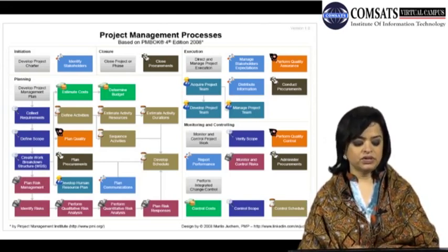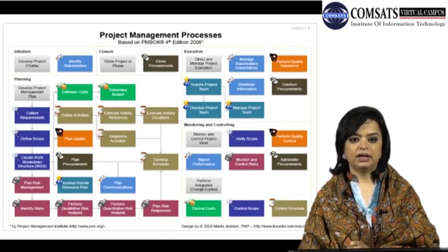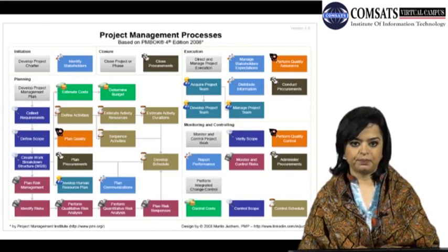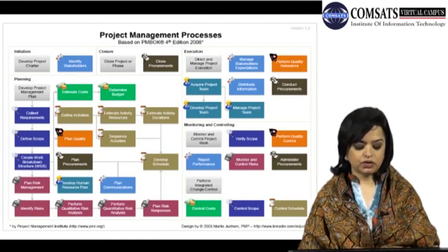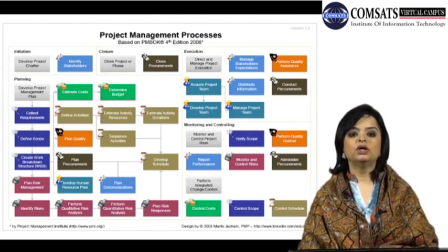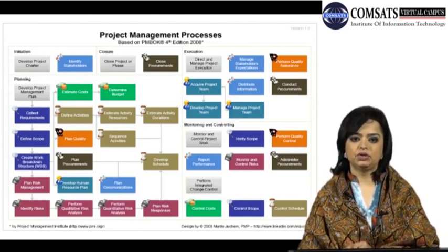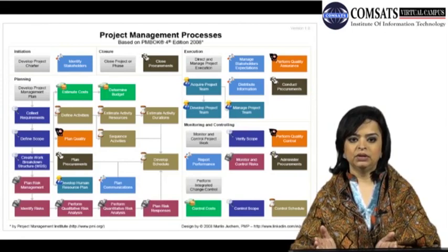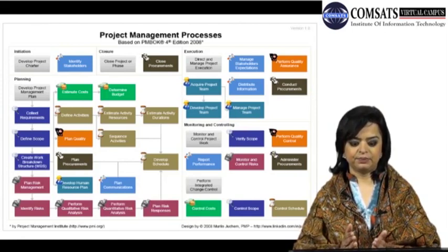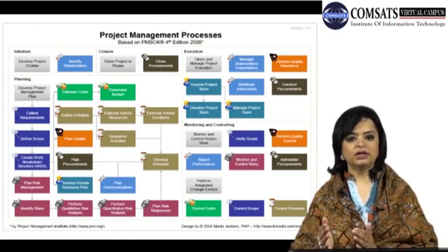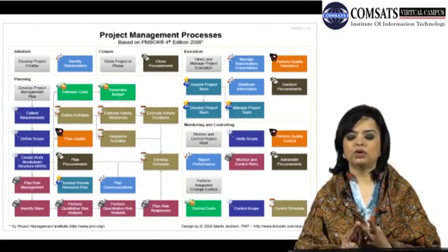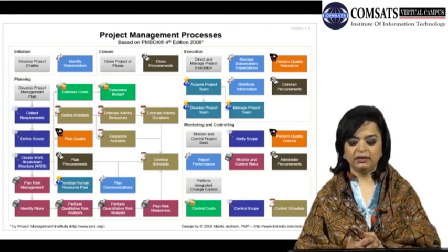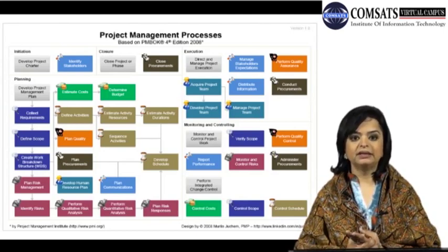The first process is the collecting of requirements, defining and identifying the scope, defining of scope, creation of a work breakdown structure, the drilling deep into it and taking the defined scope and breaking that apart into other activities and sub-activities. Moving on to the monitoring and control phase of the project, we have 2 processes within the project scope management plan, which is the verification of scope and then controlling of scope.